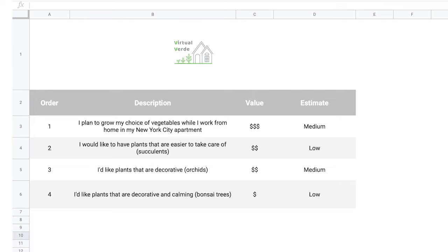First, there's the item description — exactly what it sounds like: it describes an item. When you're writing an item description, it's a good idea to be really clear, so details are encouraged. For instance, on Office Green's new project, Virtual Verde, here's an example: 'As a Virtual Verde client, I plan to grow my choice of vegetables while I work from home in my New York City apartment.' This item description includes essential details such as an action and a location from the perspective of the customer, ensuring the development team has enough information to meet the user's needs.